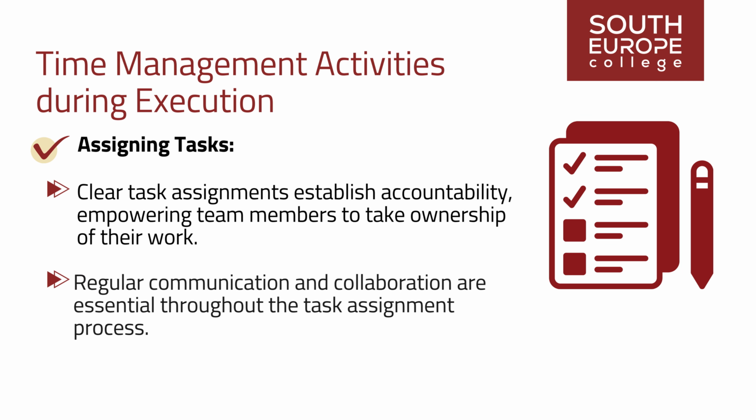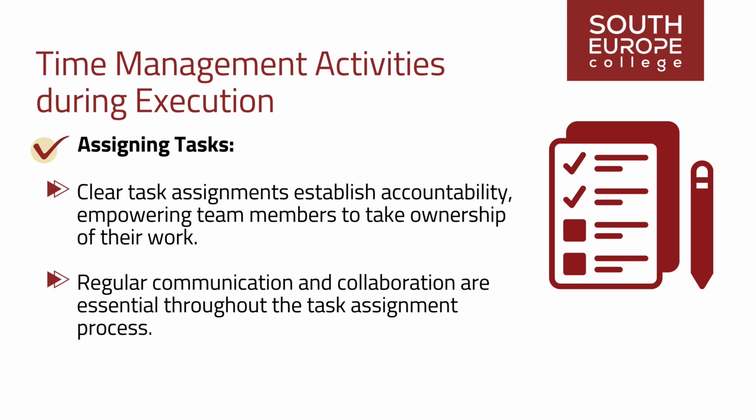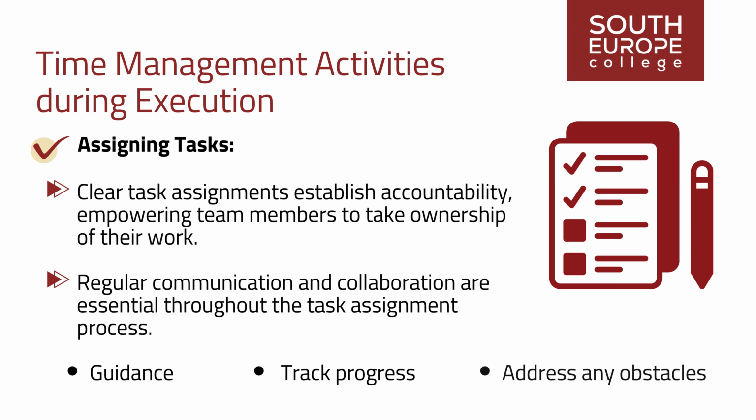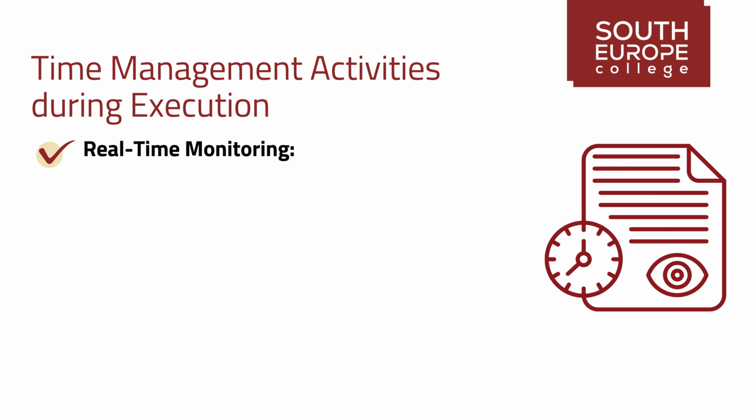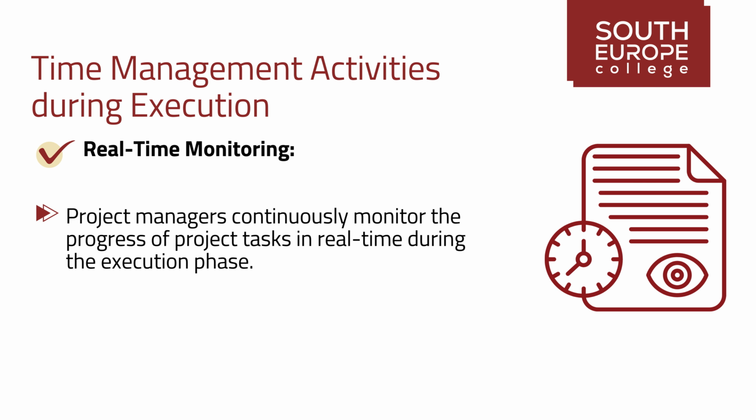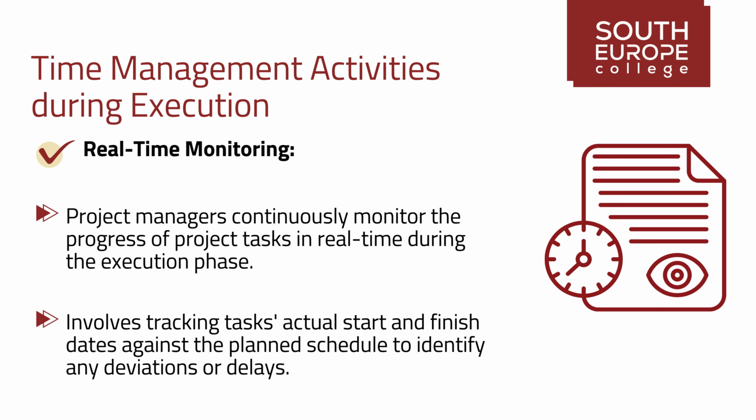Regular communication and collaboration are essential throughout the task assignment process, enabling project managers to provide guidance, track progress, and address any obstacles or challenges that arise. Real-time monitoring. Project managers continuously monitor the progress of project tasks in real time during the execution phase. This involves tracking tasks' actual start and finish dates against the planned schedule to identify any deviations or delays.